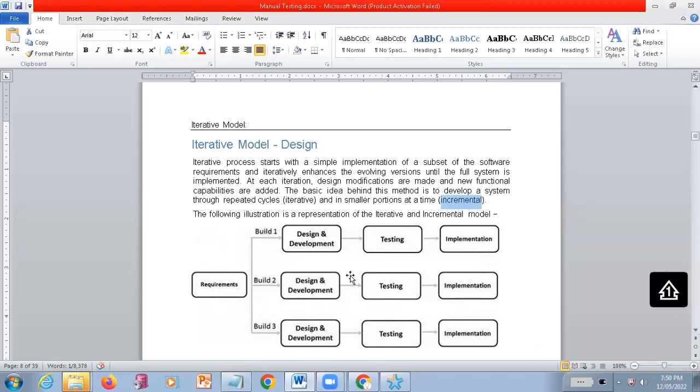So for example, in this scenario, from our end, maybe we are having only 4 or 5 developers with us. What we will do is we will either borrow the remaining developers from some other teams and we will start the process in a simultaneous manner and complete it. You are getting this or not?